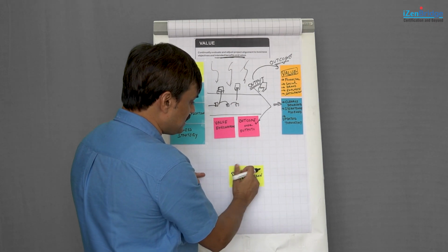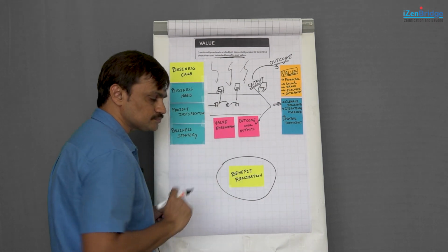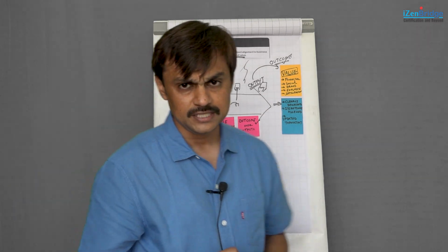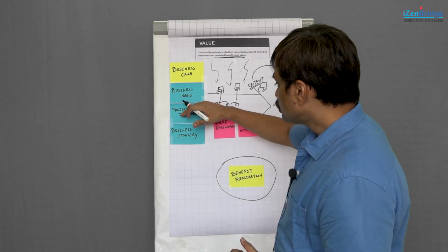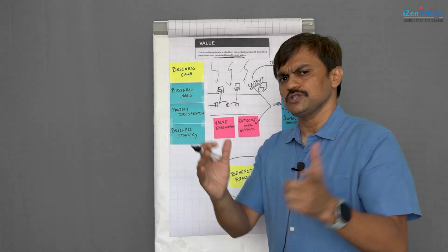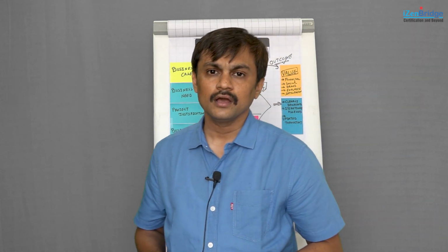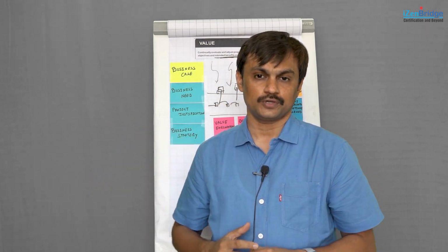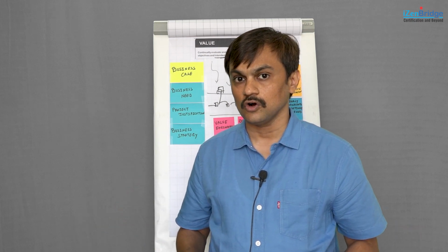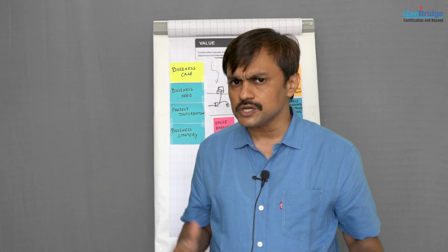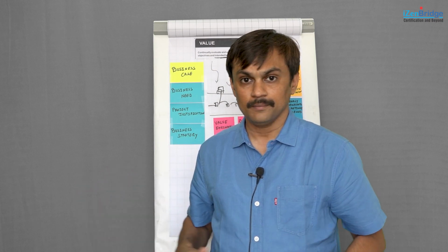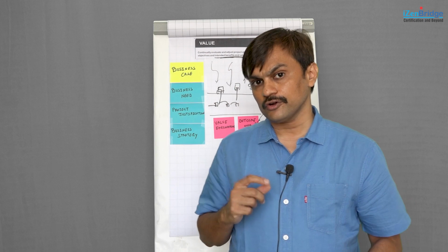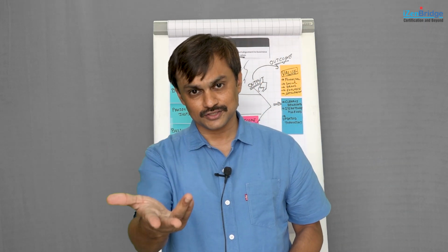Now, the other element is benefit realization. Let's observe this concept, and then we are done with this principle. Throughout the project, you may produce a robot, so let us stick to that example. How long will it take to generate savings from this robot? Maybe the robot is operational for the next 10 years. Maybe it requires maintenance every year, but it will serve a 10-year purpose. So, the benefit from your project may get spread across 10 years.